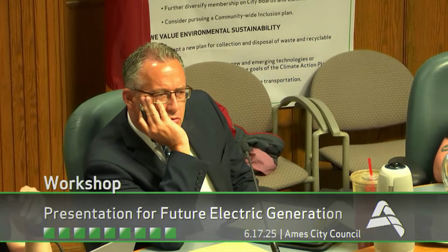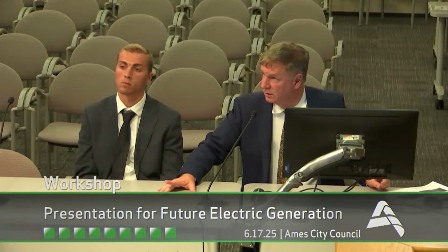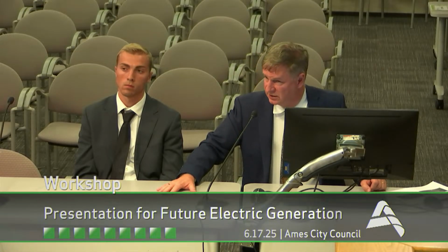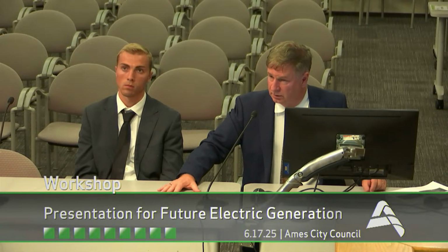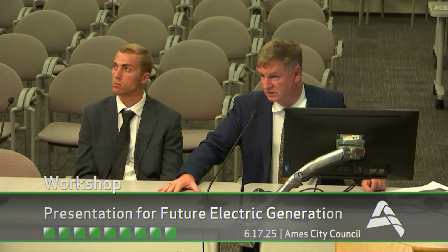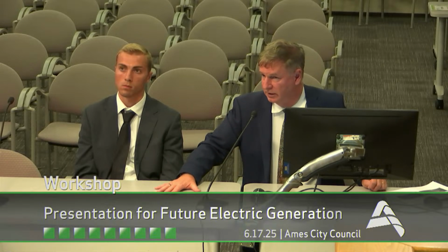So right now we have about 2 megawatts. We have a 2 megawatt solar farm sitting at the airport. So right now we're looking at probably adding about 26 megawatts, and it's 4, 5, 6 acres per megawatt. Key is to find the right land, find the right landowner, and then be able to tie it onto the system and get it back here. So 26 megawatts should get us about 10% of our energy.